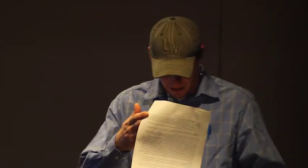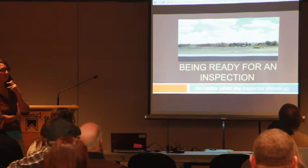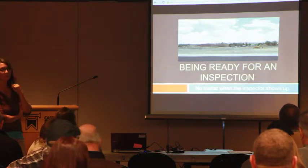But again, a lot of that is outlined in our municipal code. And I'm getting that right out of 1220 on the code itself. And again, a lot of your insurance policies are usually for a year long. If your project goes for over a year, you need to resubmit your new insurance policy to us so it can be on file. And those numbers don't change; they're still the same numbers from year to year. So that was a good question. So, you guys have any other questions like that as we're moving on? Just definitely let us know.